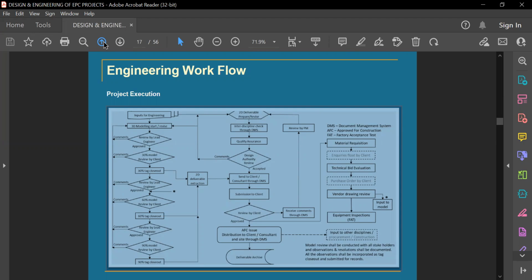So in the end, you can visualize the complete plant in 3D fashion. So we can check whether my electrical cable tray and instrumentation cable tray have the different required gaps or not, whether they are clashing, or whether there is any obstruction. And whether the tanks and all those things are placed properly. That will give a better understanding for everybody, especially to the construction people.